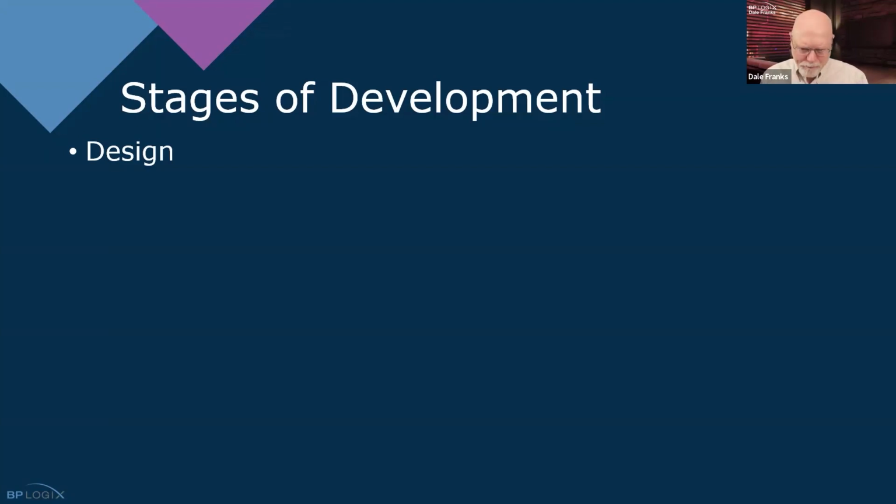What is the end state that the users will experience once they have gone through the process of using the application? What information needs to be recovered from the application? What reporting needs to be done? All of these design issues need to be discussed and finalized at the very start of the process. And indeed, this design stage may take much longer than actually building the application itself. But the development of the application is the second stage. That's when you're actively working on the application and building it.